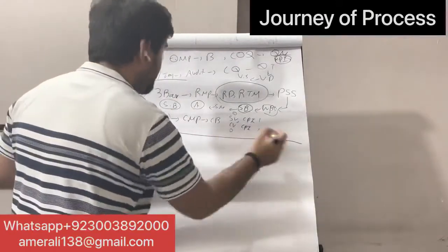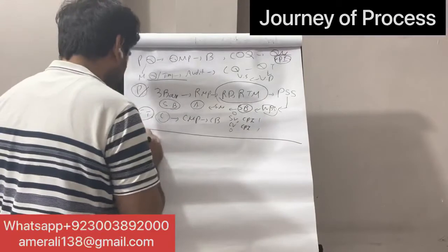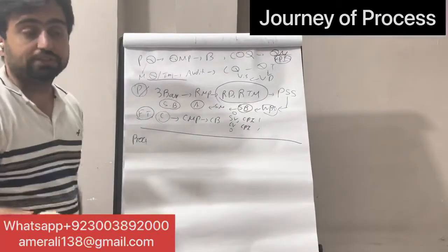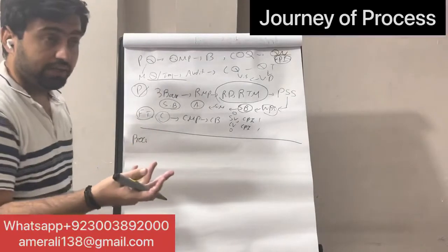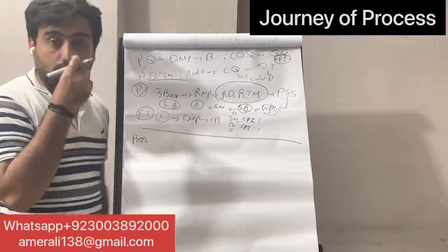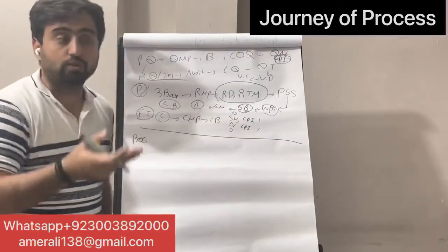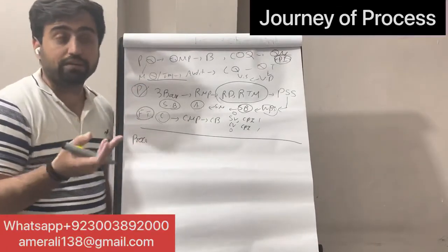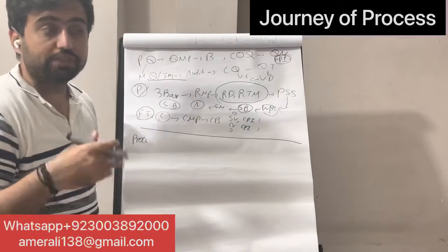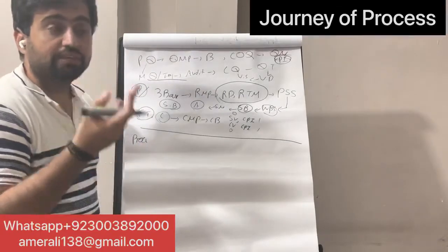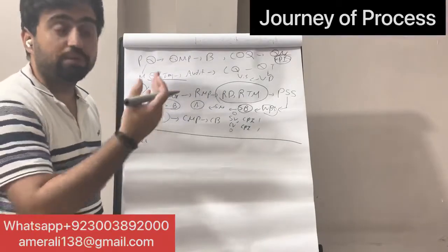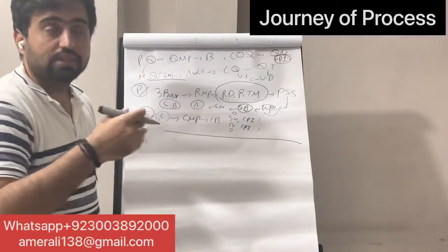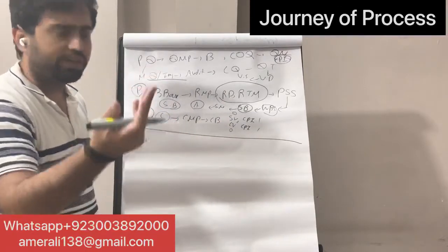Then next is procurement. You look at the procurement, whether you want to make or buy. Once you have decided that you want to buy, you decide the source selection criteria. Once you have settled your source selection criteria, you select your type of contract, depending on whether requirements are fixed or not fixed: fixed price contract, fixed price incentive fee, fixed price economic price adjustment, cost reimbursement, cost plus incentive fee, cost plus award fee, or time and material.